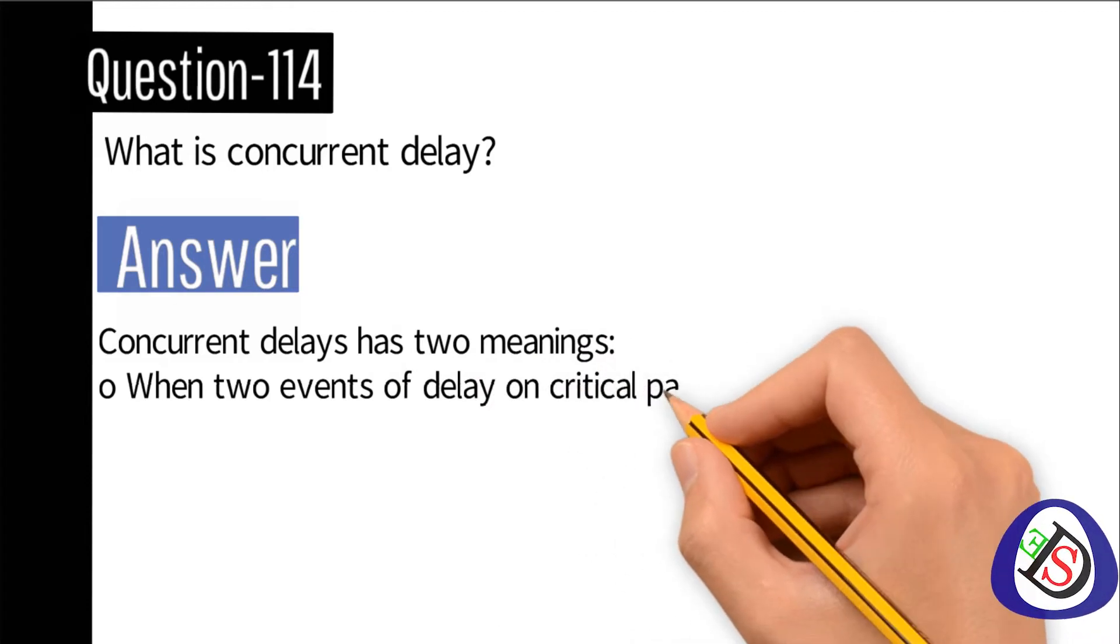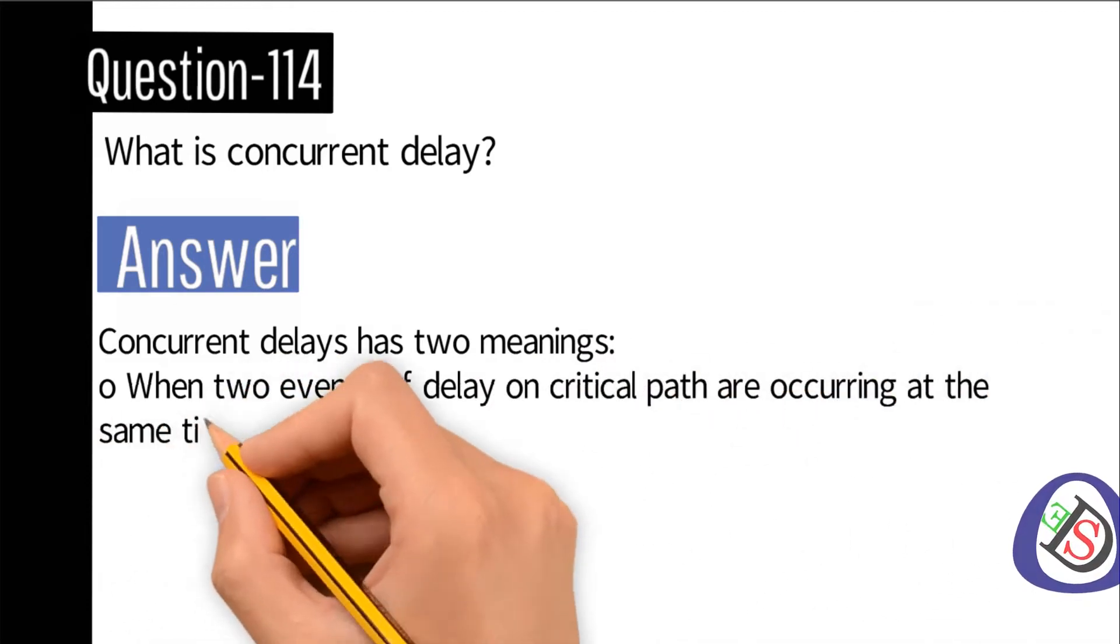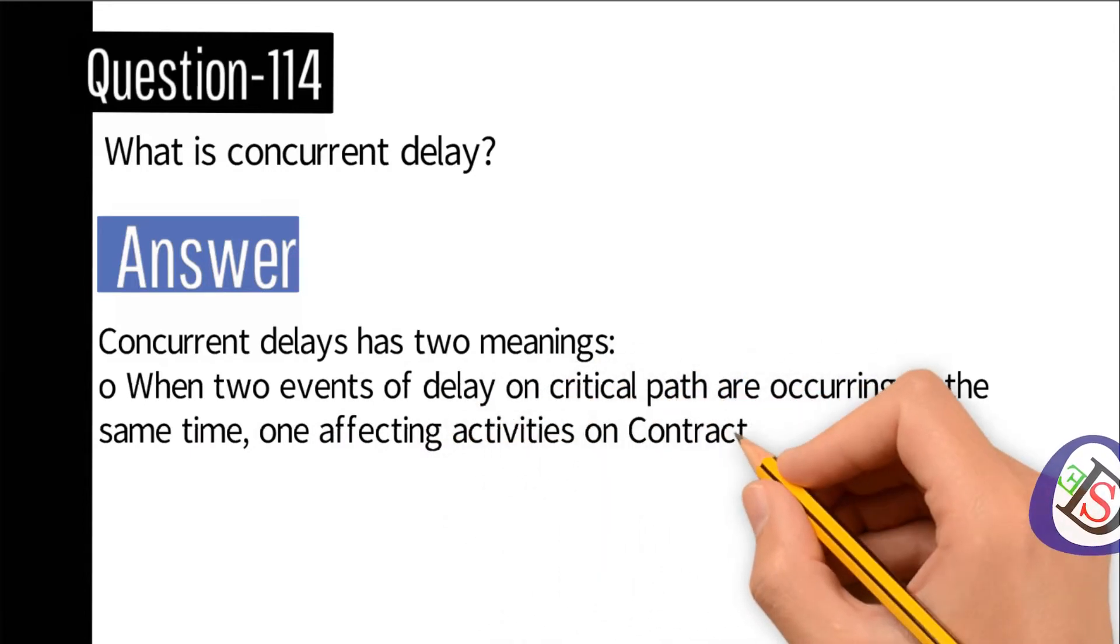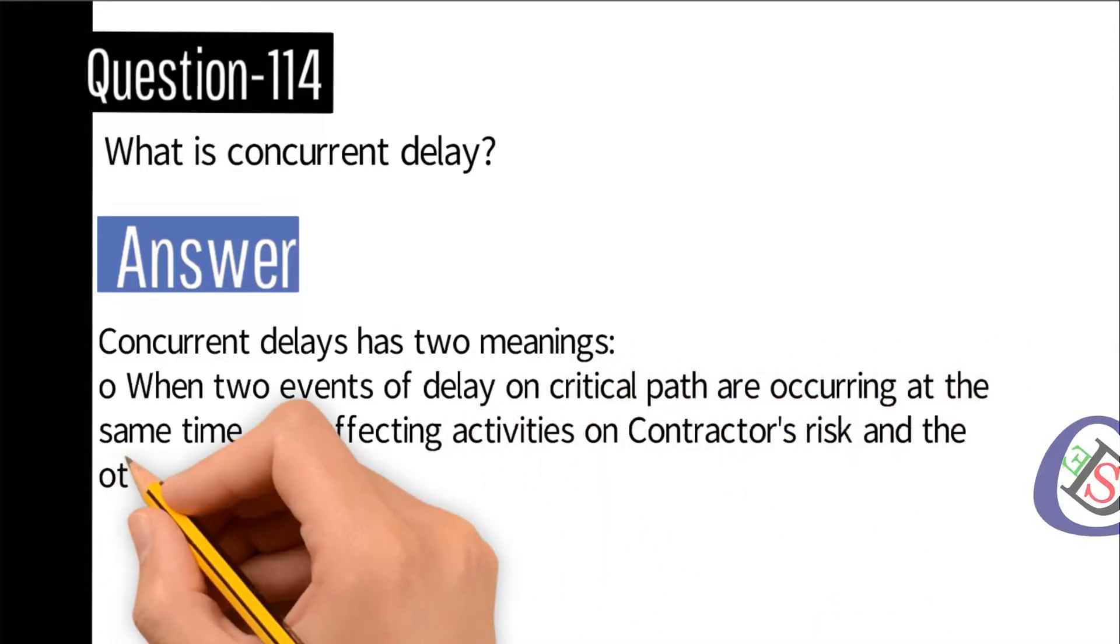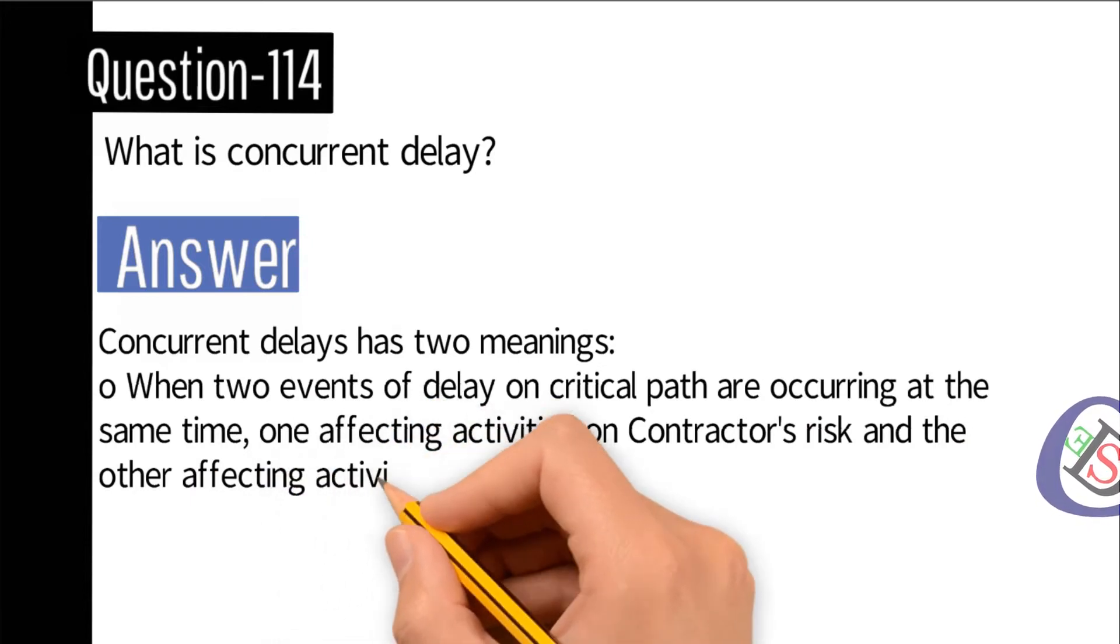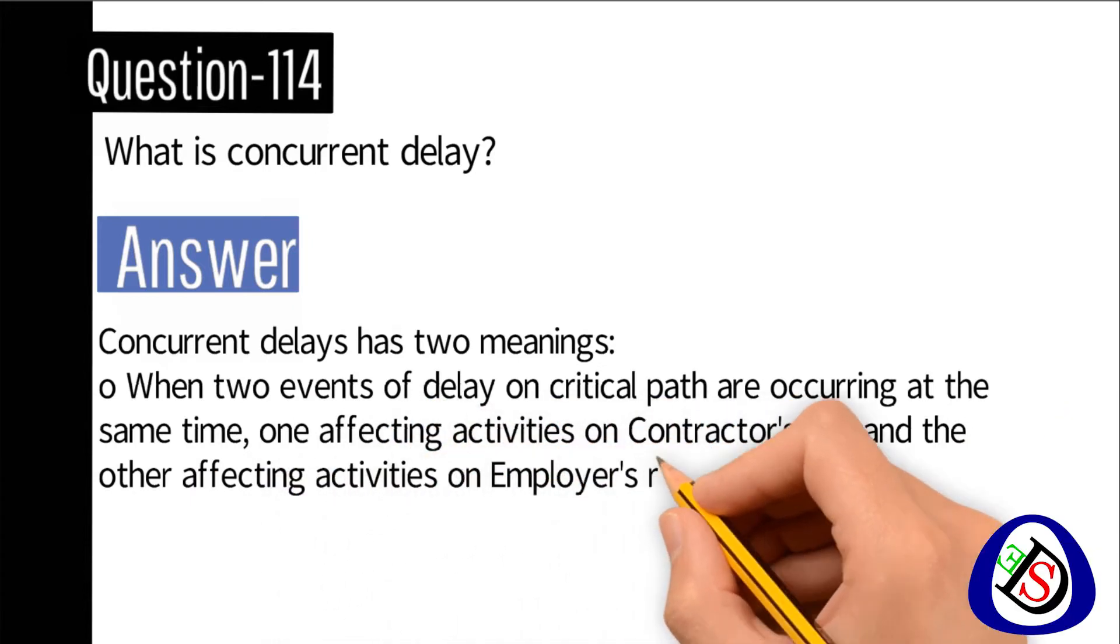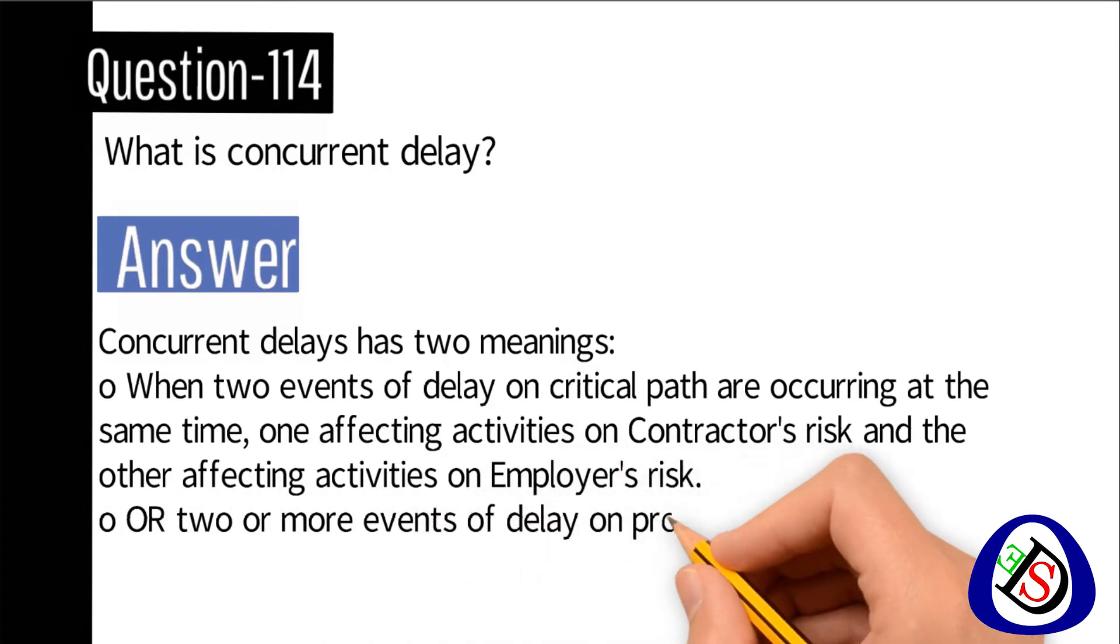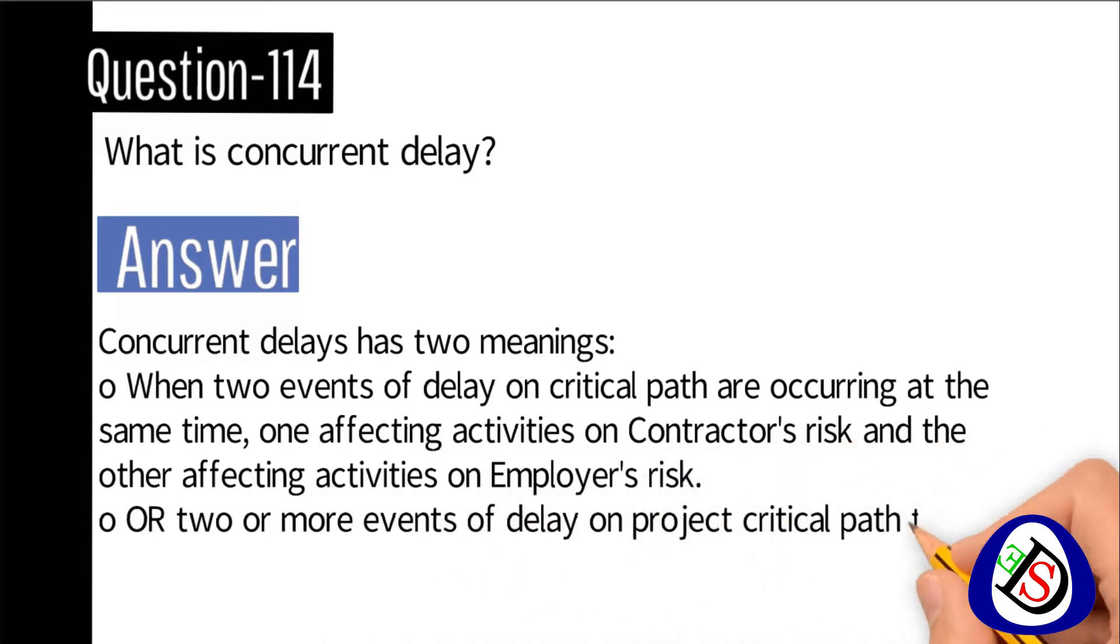One affecting activities on contractor's risk and the other affecting activities on employer's risk. Number two: two or more events of delay on project critical path that belongs to only one of these parties, contractor or client.